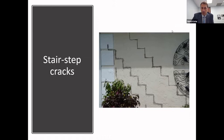I know that we have WRG on this, and some of the stucco problems and a lot of building departments are looking for this, and maybe they can give us a little bit of that. Stucco removal sometimes, and I know the City of Coral Gables is particular about this, yields asbestos testing of the stucco to ensure we are not having those problems as well. So that's something you have to be careful about when we talk about stucco problems.